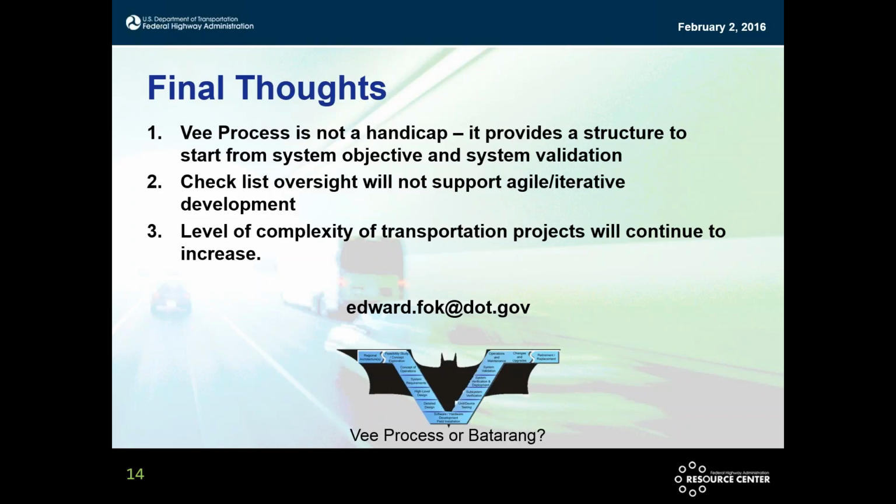Yeah, so to summarize, the question was, how does Agile work in the hardware world? I can give you an example. We were building some satellite systems, and our boards were on 3-month iterations, while the software was on 1-month iterations, and then we would bring them together for integrated hardware and software testing.